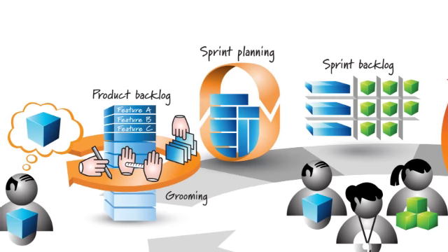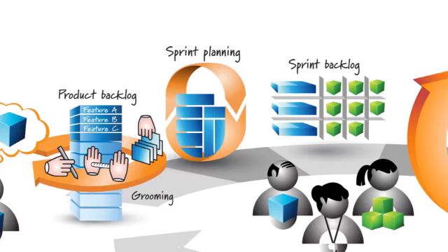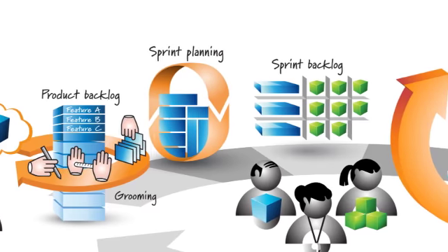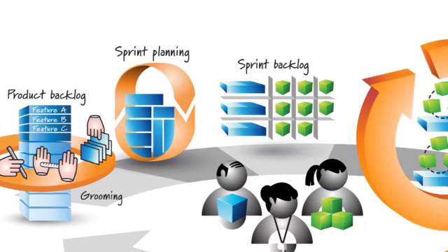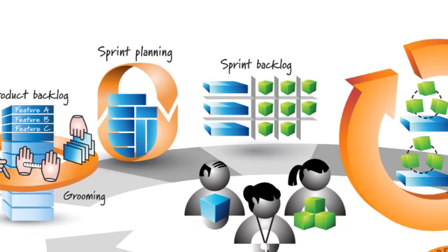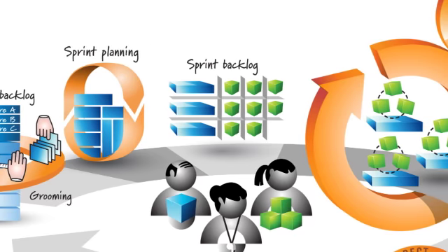You also notice to the right is something called the sprint backlog. Now, this is put together by the development team with the purpose of trying to acquire confidence. Confidence that the items that they're pulling into the sprint can actually get built and delivered during that sprint. So in this picture, the blue bricks are product backlog items. Those are features. And the green cubes, they represent tasks. Design, build, test, integrate type work.